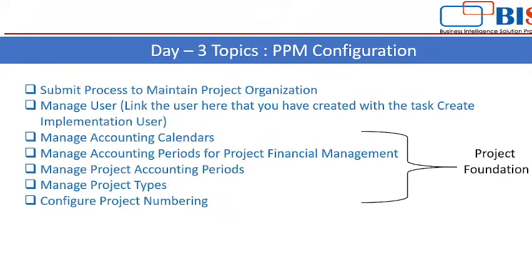Then in the next session we have discussed how to create a specific calendar for project, in case you are using a different calendar for project purpose. So in the project portfolio management module, Oracle provides the functionality to use a different calendar from your general ledger calendar. Say in the project you are using the frequency of period as weekly, then in the project you can create your own calendar.